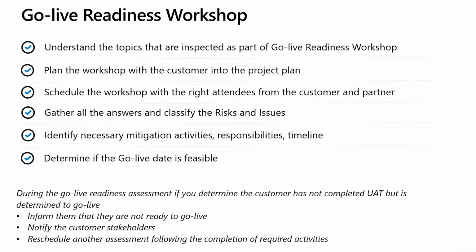Now you know what the workshop is about and the purpose of it. How can you prepare? Make yourself familiar with the topics of the workshop, and the more go-live readiness workshops you complete, the more this will become a natural thing for you. But do prepare the project team itself so that the time spent there is spent efficiently and wisely. Put the workshop in your plans, in the project timeline, and ensure that the customer is also ready.